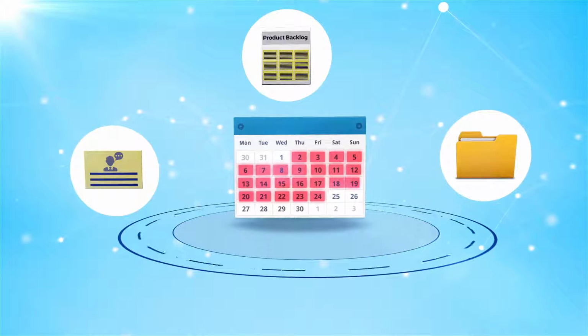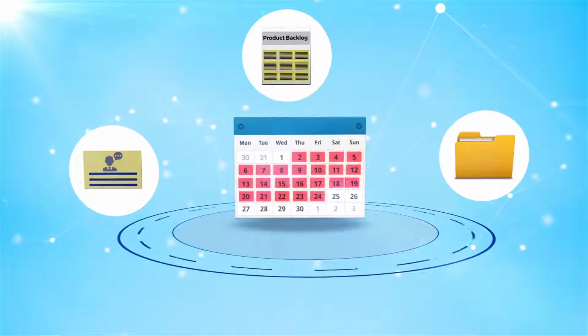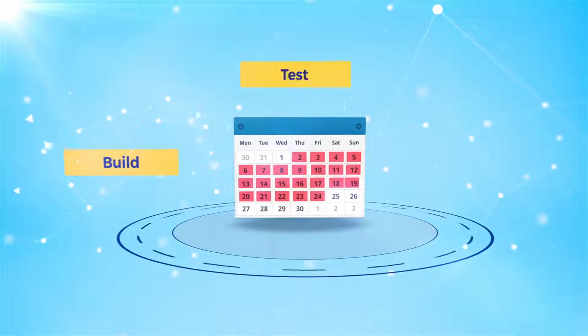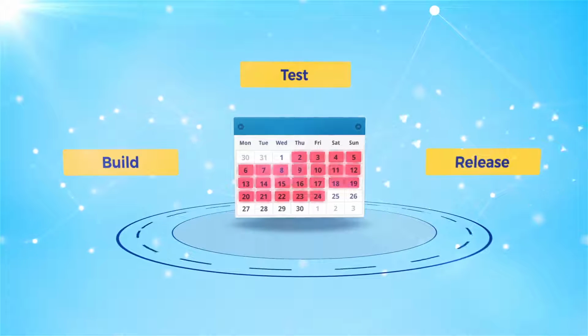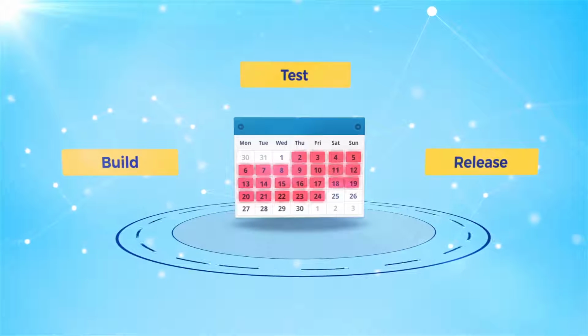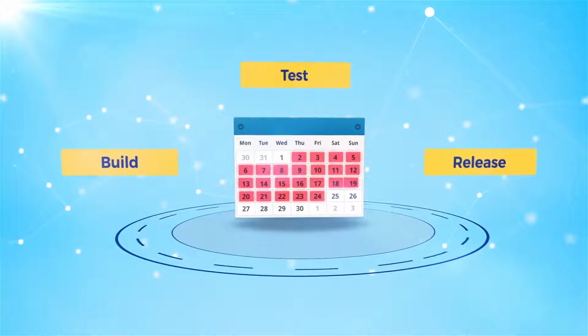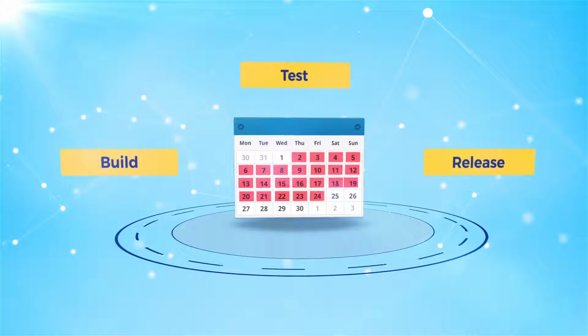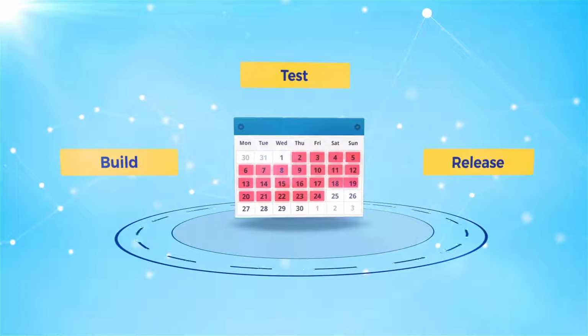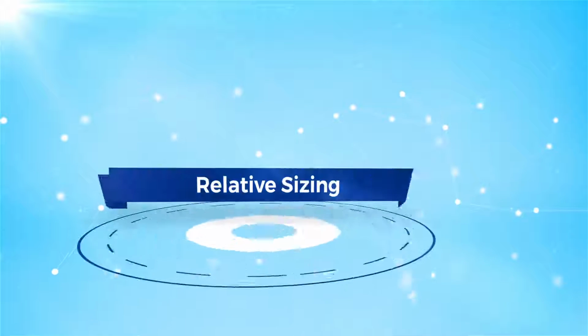Ideal days are how many days it will take a single developer to build, test, and release the functionality described by a user story under the ideal conditions. Ideal conditions refers to no interruptions and that all resources are available.